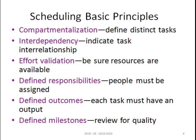The next principle is defined outcomes — from each and every task we will have an output, so that has to be measured. Each task must have a measurable output. The next principle is defined milestones — milestones will be achieved only by reviewing the quality of the task. While you complete your task, the output has to be measured as a quality output, and that is why milestones are defined.